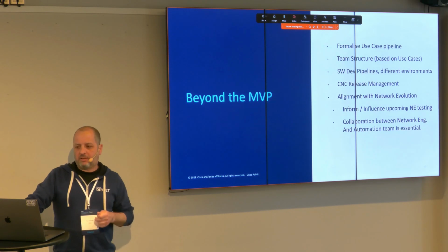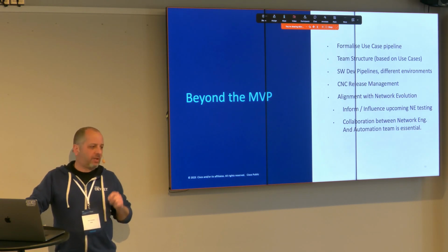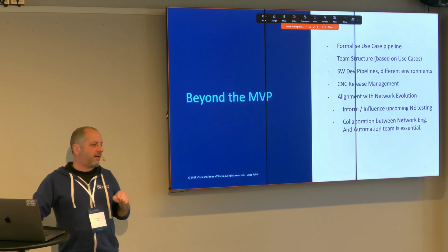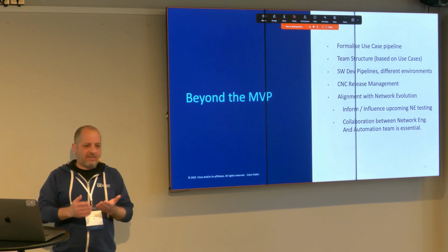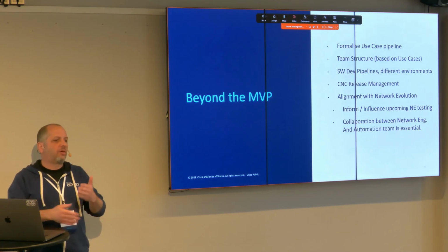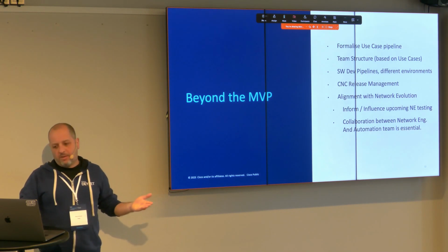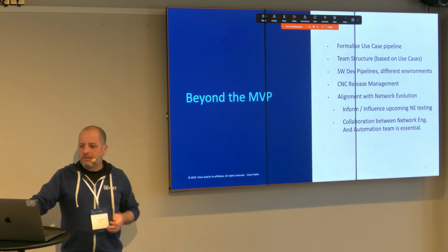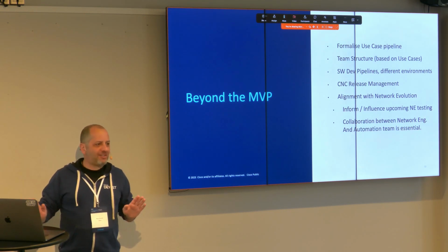So you need to plan in advance if you want to upgrade to every release or you want to skip some, and that's it. And again, the message here is align with the network engineering department, making sure that all the features that you need for the CNC deployment are aligned to their testing activities. So make sure that they test, for example, PCEP or latency measurements, as well as the typical validation activities that they do as an engineering department. My part is finished. Any other question?